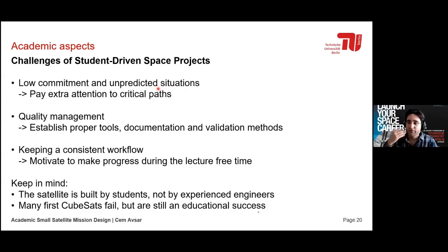Students want to volunteer. So be careful with that as a lecturer, especially, or if you run a student team as a student yourself, you will get lots of questions from other students who want to somehow take part in that project. And if you have the feeling that this student is busy with other things, can't dedicate as much time, or is maybe not as reliable as I need this person to be, then what I recommend is to pay extra attention to critical paths. There are some critical paths in your project, with some very important tasks, and use your most reliable, most driven, most skilled people on those paths.